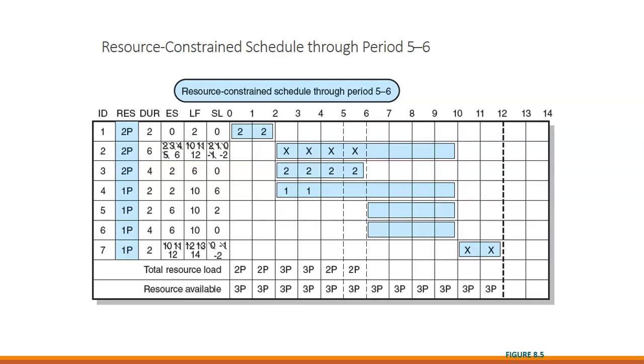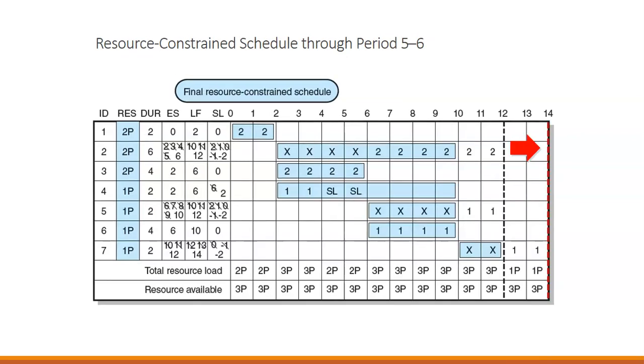So then once we've rescheduled those, using our early start, late finish, and available slack, we're changing our resource load to having 3 required instead of the 5 that were original. So we're pushing piece 2 off by using the slack available for it. So now we've pushed 2 off to its late start date.